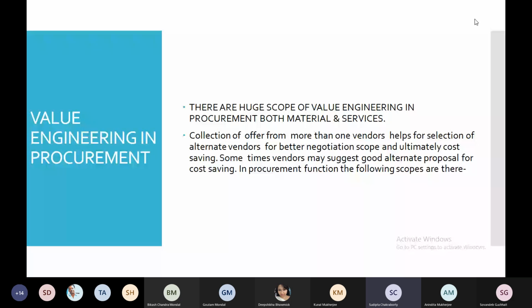For private clients it may be applicable, or for some reluctant clients like the Heavy Water Board, who generally approve a vendor if the vendor is good or matches the tender specification. They can approve any alternate vendors. But clients like NTPC, EIL, IOCL are very conservative. Based on my knowledge, they are not going to give any alternative vendor apart from their approved vendor list. So with this kind of client, it is very difficult to get approval.